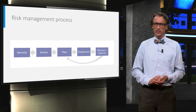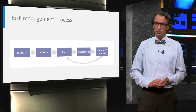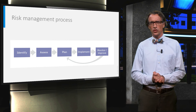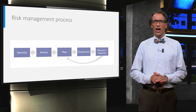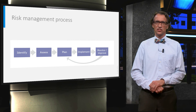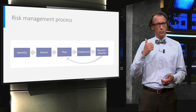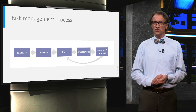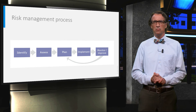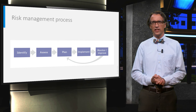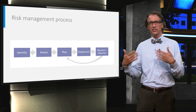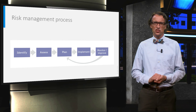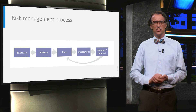Where do the risk mitigation strategies fit into the risk management process? We start by identifying risks, for example in a risk workshop with the project team members. After gathering an initial list of the risks, they are assessed in terms of probability and impact. Based on this assessment, risks are prioritized and appropriate mitigation strategies are selected and further planned. The strategies are implemented, and finally, throughout the process, the outcome and status should be monitored and, if needed, action is taken.